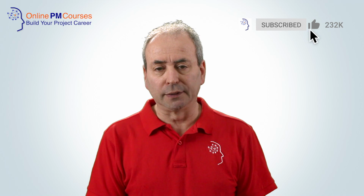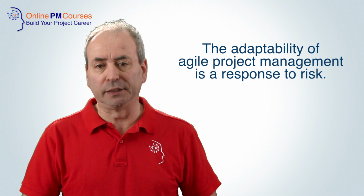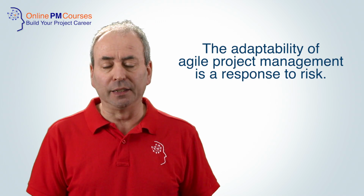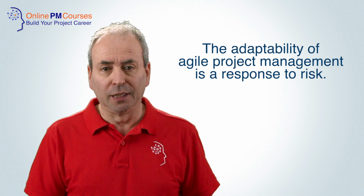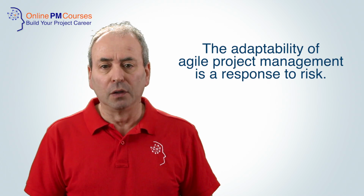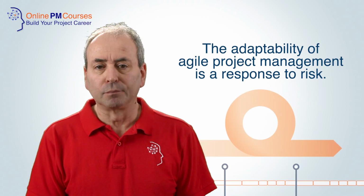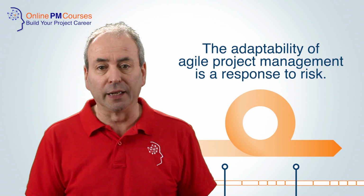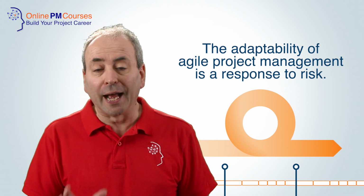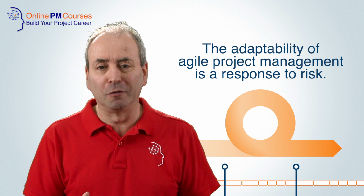However, there are elements of risk management that differ in agile projects. First, the adaptability of agile project management is a response to risk. Where we do not have clarity about what it is we're producing right at the outset, then one way to manage the risk of that uncertainty is to adapt and learn as we go, to tackle the project in a number of iterations rather than to plan the whole thing at the outset. Because each iteration bites off only a small chunk of the requirement, it limits the risk we are taking at each iteration. Often, as risks increase, we reduce the iteration cycle time so that we're biting off smaller amounts of risk with each cycle.